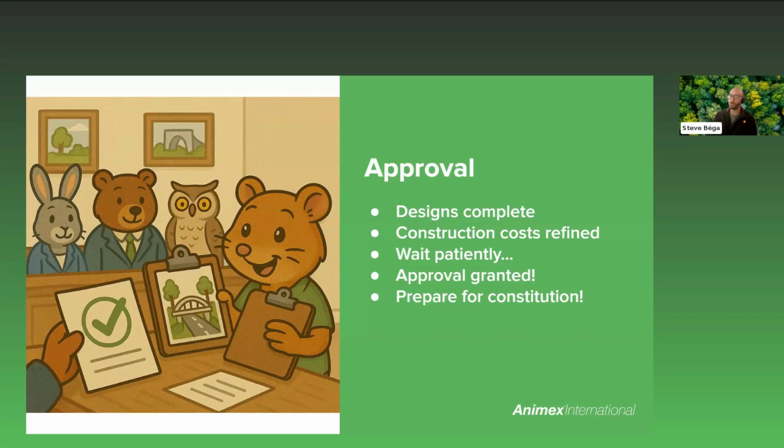As part of the approval process, especially for long-term or permanent structures, you will likely need an AIP, or an agreement in principle. This is a comprehensive, formal pre-design approval document that outlines the design, review, and approval of a highway structure. It includes the scope, standards, loads, geotechnical data, durability, maintenance strategies, and amongst a whole host of other things. If an arboreal crossing is combined with another structure like an underpass, they can often be included under a single AIP. But again, check with your planning team and the Highways Authority if a road is involved in that.